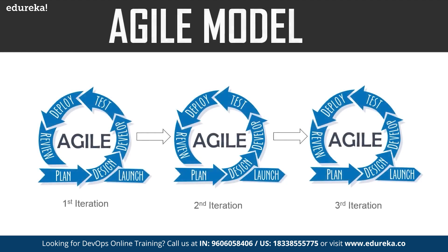The next model is the agile model. In this model, the software is broken down into various iterations. Each iteration has various phases such as planning, design, development, and so on. The duration of each iteration is generally two to eight weeks. In the agile model, you release the software in the first iteration, then gather feedback from end users, incorporate those changes into the second iteration, and release the software again, repeating this cycle.